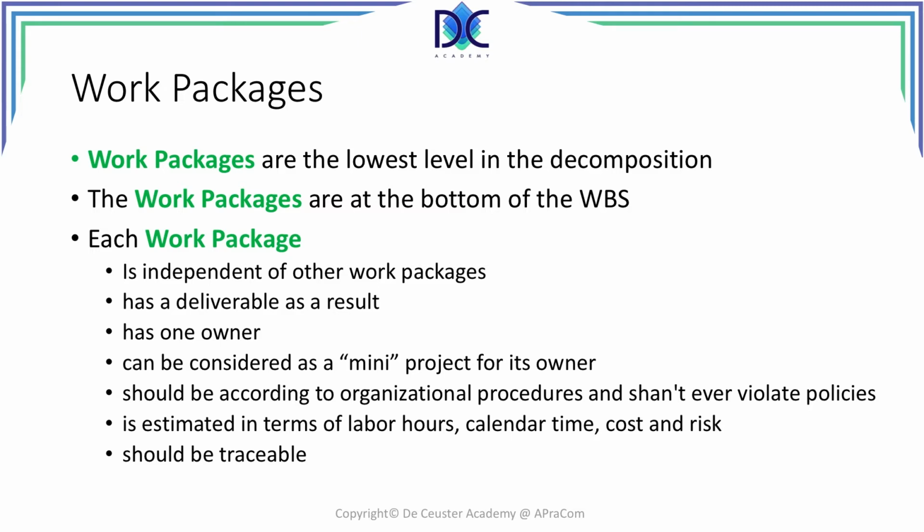The work packages have to be defined according to the organizational procedures and shall never violate policies. Work packages can be estimated in terms of labor hours, calendar time, cost and risk, and should be traceable. In smaller projects, a work package can be the same as an activity, but typically we can further decompose work packages into activities.